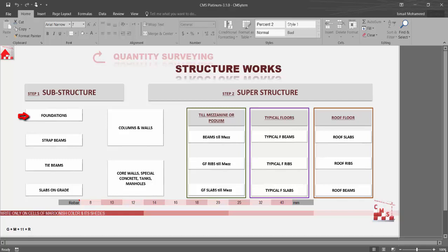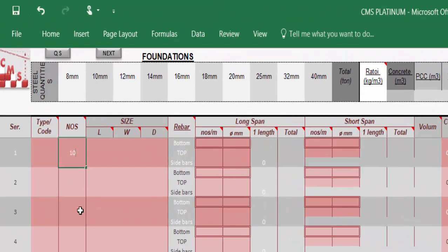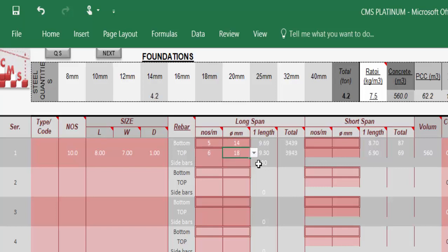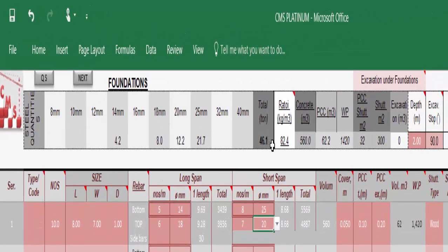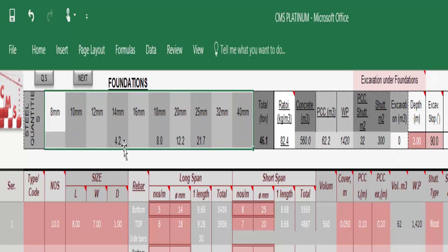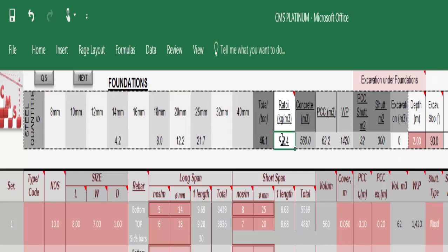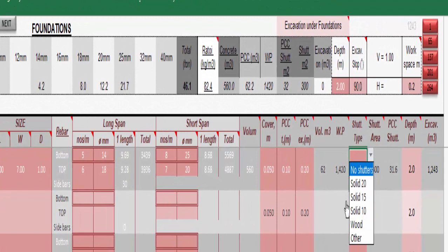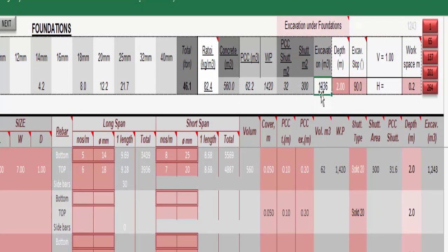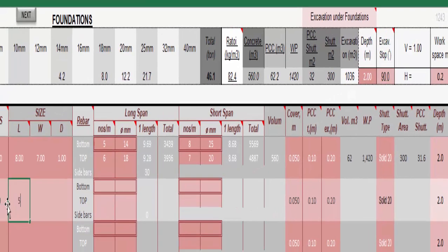For foundations, we only insert the numbers and dimensions for the foundations with the rebar reinforcement according to the drawings — the bottom and top reinforcement for the long and short span. CMS directly gives us the quantity of reinforcement concrete, the quantity of blinding concrete, the detailed quantities of rebar per diameter, the ratio between rebar and concrete, the waterproofing and shutters for the foundations, the type of shutter — block, wood, or otherwise — and the excavation quantity.